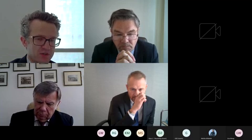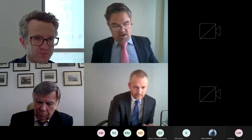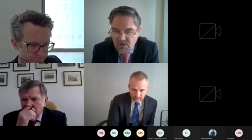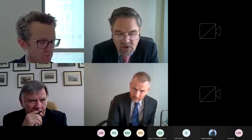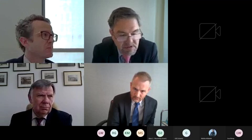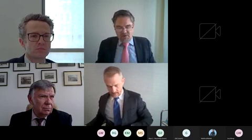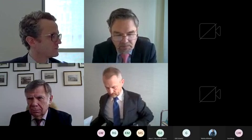I see. So have you taken a contingency right at the bottom of the scale of what you've seen in your experience? Again, it goes back to the nature of the contract. Is it fixed price? How far are you with the design? As I said, the biggest issue you've got to account for with contingency is variation. And if you have a well-designed building and the client has been informed all the way through the design process and is not going to interfere again, then that contingency should be more than enough. But again, you've got to look at it on individual merit, and I've made that assumption. If that wasn't the case, then the contingency should increase.